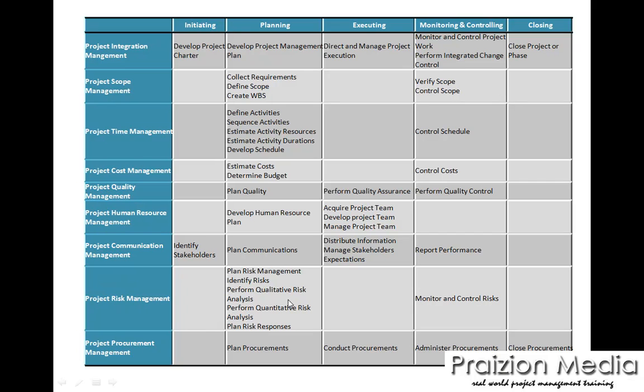You need to keep an assessment of if these people have become more powerful. Perhaps one of the stakeholders suddenly becomes a VP or CEO. They could have more power as the project proceeds. So you absolutely need to keep tab on them and identify their interests throughout the project. For that reason, the Manage Stakeholders process has been moved into the Executing process group. Those of you who studied the PMBOK Guide 3rd edition remember that we had this process under the Monitoring and Controlling process group.